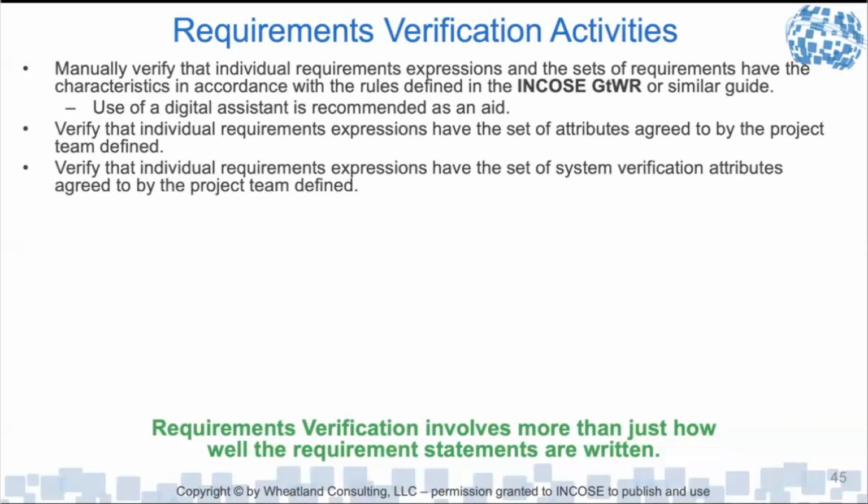So we're always thinking ahead to the verification of our test cases. That's the key characteristic, is the requirement verifiable. So we're going to think ahead to verification. What method are we going to use? What's the success criteria? What methodology are we going to use? When are we going to do the verification? Who's going to do the verification activity? We need to think ahead of that. It drives cost and schedule, and it also helps us craft better requirements.